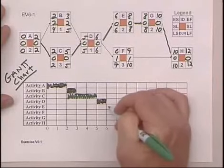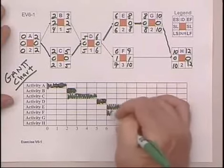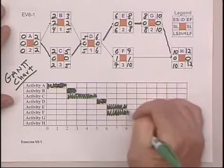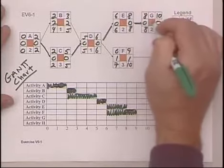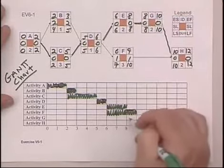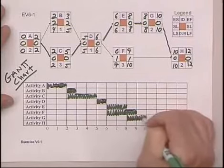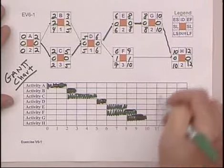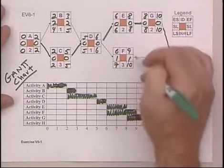And then as soon as E's done, G can start, which is the eighth period. That takes two days. And then finally H can start when both G and F are completed, and that's not until the end of the tenth day.